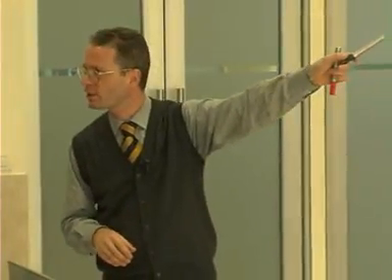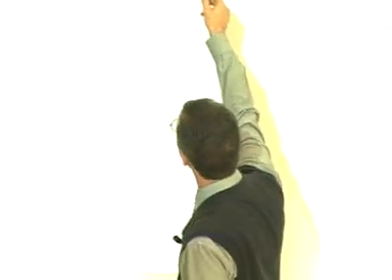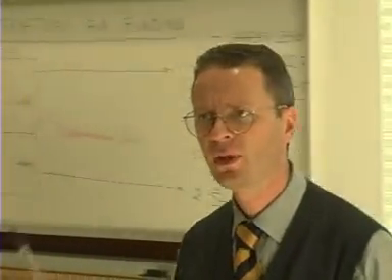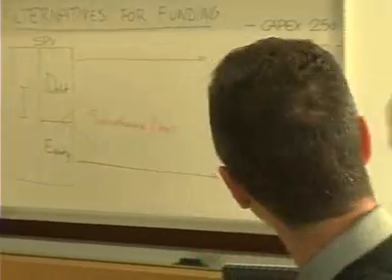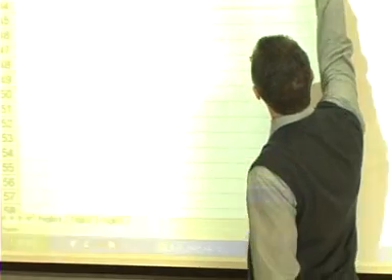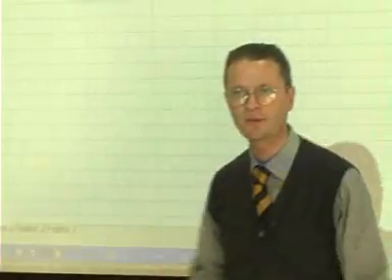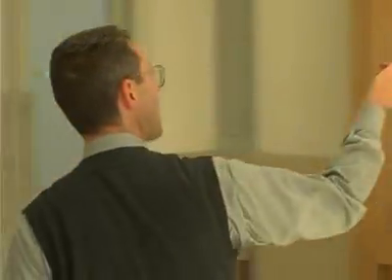You see that the dynamics of cash flow changes, because during the first year, lenders provide only a minimum amount of cash. The amount is 100, because the largest part of funds is provided immediately by equity contributors. You can see immediately that the amount is placed for the whole amount, 150, at the beginning of year one. Obviously, from this point on, no more equity is required, 0, 0, 0, and the lenders will provide the amount of 250, 250, 250 for all the remaining 3 years. Total amount returns the value of 850 again, and the amount of equity is 150 again.